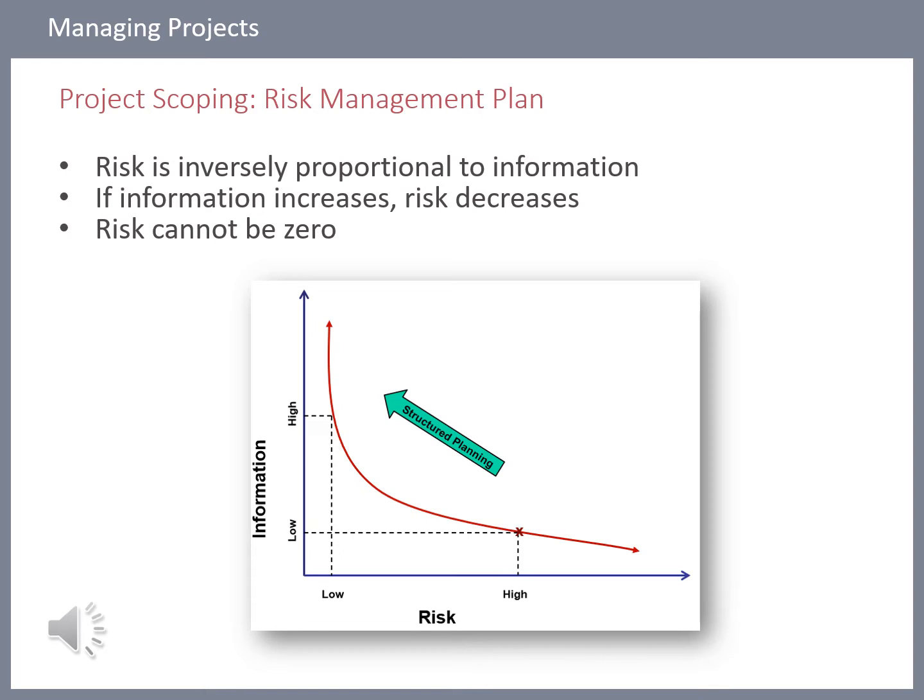Now you get the job, and you say, wait a minute, I need to know what's in the ground. So you take some trial pits, you do some looking at some information that you have maybe about the area, and from this information you can say, well, I know now there's a water pipeline going there, there's a sewer line going that way, there's some electricity over there, and there's nothing else I know about from my trial pits, about any graves or anything else in the ground, which means I have reduced my risk. I know what's going on in the ground.